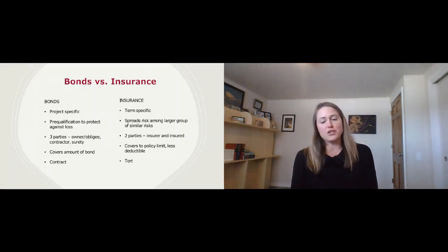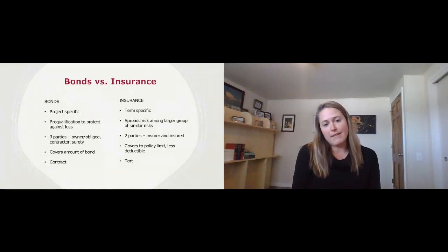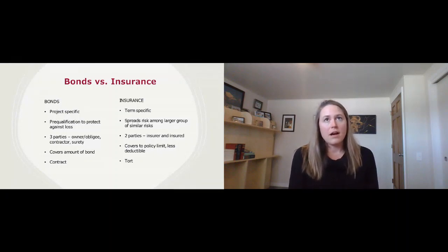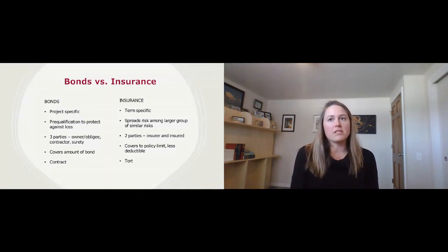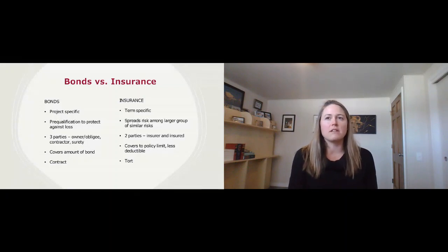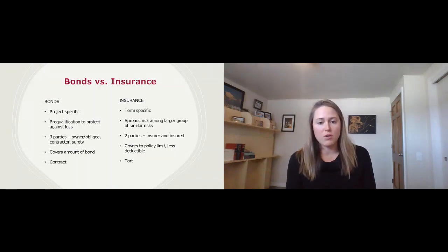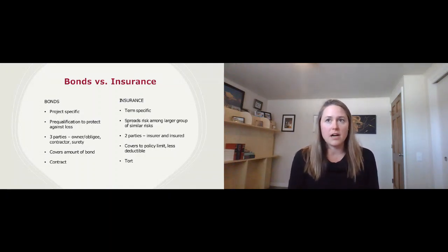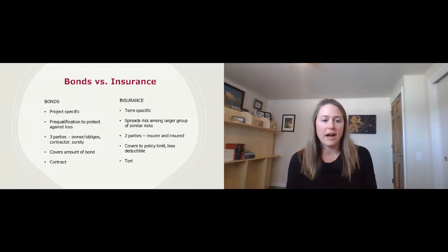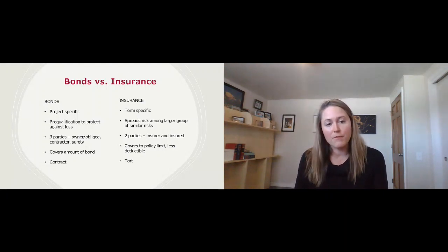Each individual contractor on a project is going to have their own insurance. They're going to have their own relationship with their insurance carrier and their own policy with its own terms. Oftentimes you will encounter situations, and I'll touch on this a little bit later, where the contract on the project, between, let's say, the owner and the general contractor, or the general contractor and the subs, will actually have requirements for your insurance.